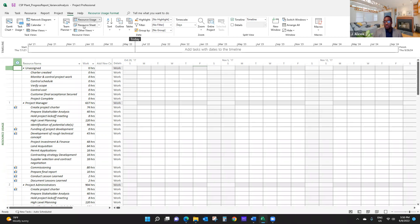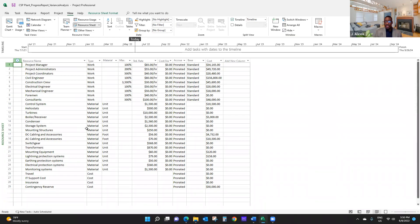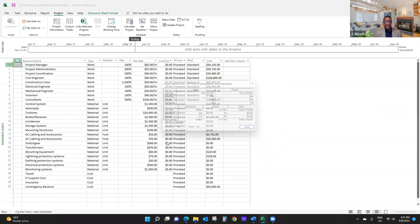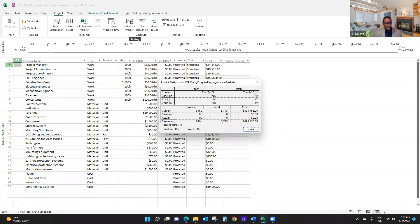I'm going to take a look at my resource sheet here. I see I do not have any over-allocations, so that's great. If I take a look at my work resources, I don't see any over-allocations either, so that's fine. Another thing I need to make sure of is to look at the project baseline itself. Let's take a look at project information, statistics, and take a look at the baseline. As you can see here, I do not have a baseline, so I can't really report progress or perform variance analysis. I need to have a baseline because it will serve as the standard to which I will compare my performance later. You can't perform variance analysis without a baseline.